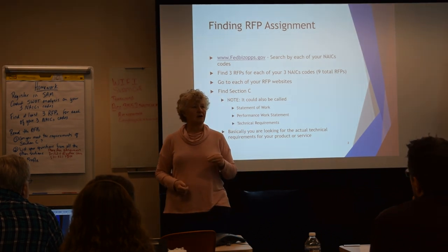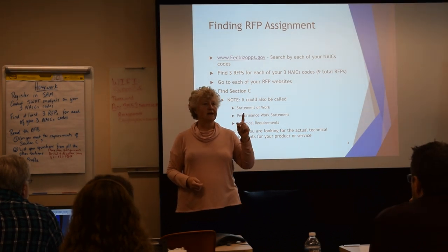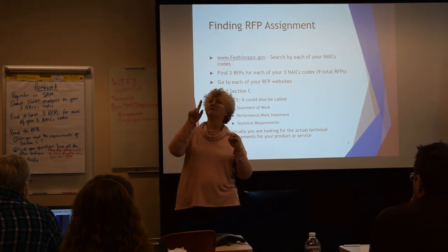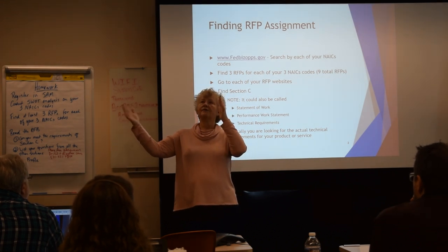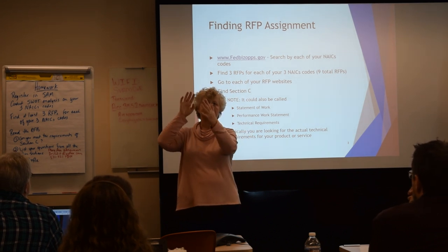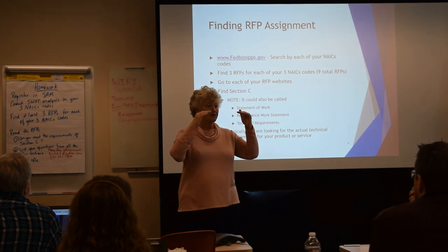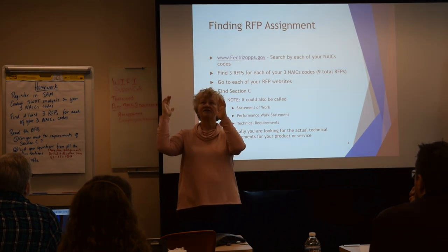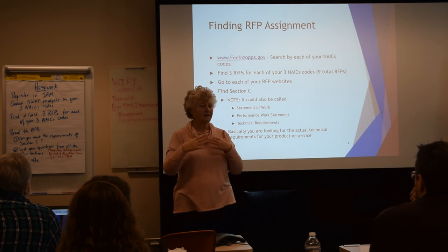In a statement of work, I would say something like, I want to light this room. And I want there to be 12 lights that are 3 feet by 2 feet. And I want them spaced X number of inches apart. So do you see how the contractor shall provide 12 lights, they shall be this large, they shall be this far apart, very thou shalt, okay?